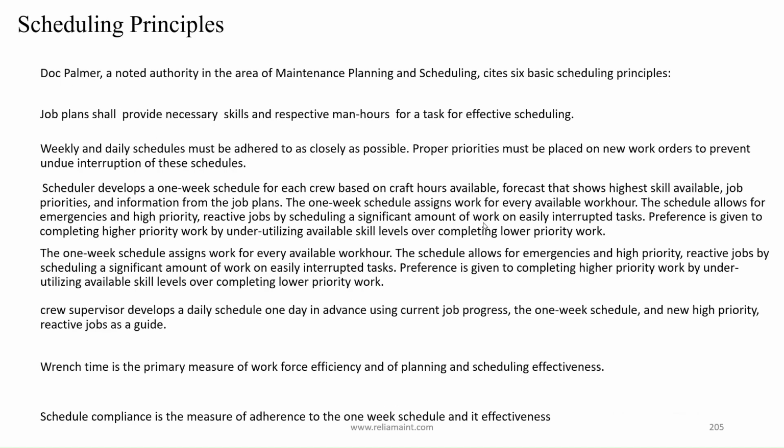Preference is given to completing higher priority work by underutilizing available skill levels over completing lower priority work. Crew supervisor develops a daily schedule 1 day in advance using current job progress, the 1-week schedule, and new high priority, reactive jobs as a guide.